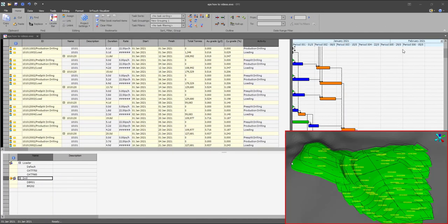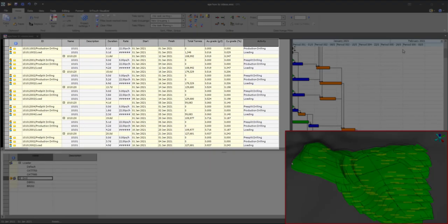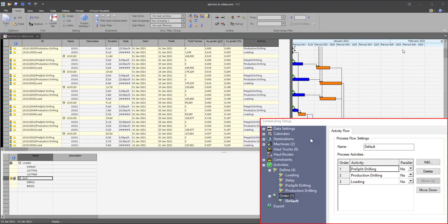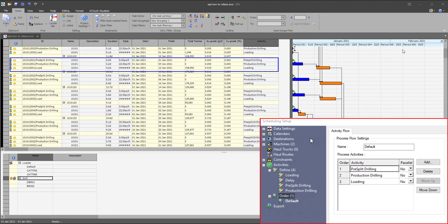Mining blocks are represented as tasks on the task table. Any activities defined on Studio OP are transferred to EPS with the task ID and name fields generated by joining the block ID of the task and the activity name.